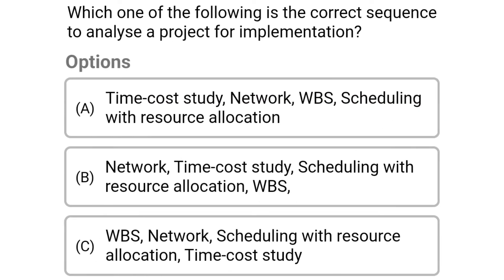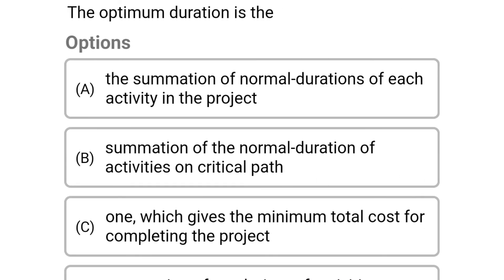Next question: which of the following is the correct sequence to analyze a project for implementation? Option A: time-cost study, network, WBS, scheduling with resource allocation. Option B: network, time-cost study, scheduling with resource allocation, WBS. Option C: WBS, network, scheduling with resource allocation, time-cost study. Option D: WBS, time-cost study, network, scheduling with resource allocation. The correct answer is option C: WBS, network, scheduling with resource allocation, and time-cost study.